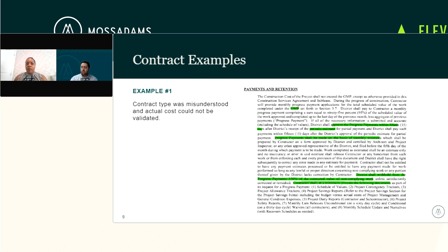So a pencil copy of a payment application is going to be a draft version. So let's say the April 2025 payment application is going to be submitted for payment. So roughly on probably the 20th to the 25th, a general contractor will typically submit a pencil copy of a payment application to an owner for their review. That will include all of the subcontractor invoices and subcontractor payment applications as backup, and then the contractor's schedule of values and what they're submitting for payment for the month of April.